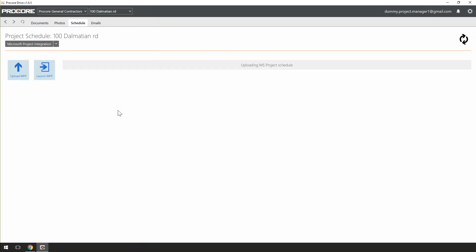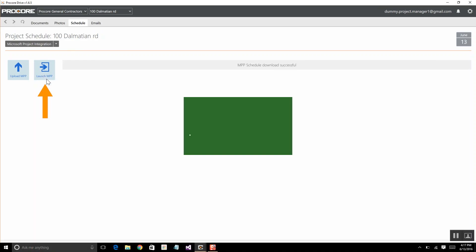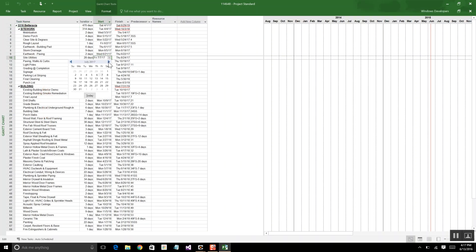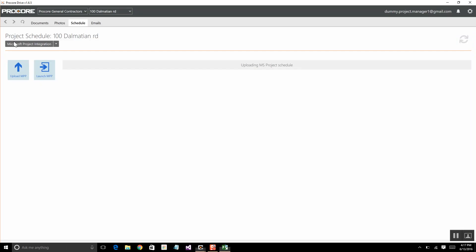Furthermore, when a change needs to be made to the Schedule, you can simply open the Schedule through Procore Drive, make your changes, and then Save. Procore Drive will automatically recognize the new version and publish it to Procore, with the change reason, without any work on your end.